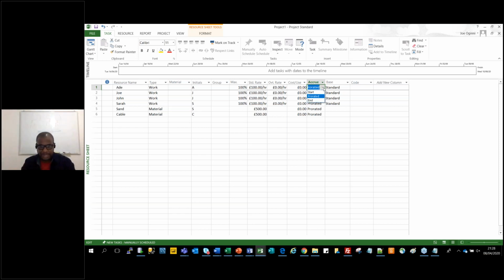But if you put it like you pay them at the end, you may be having too much money on paper, but not enough money in the account. Why? Because your system is not calculating it as it should be. And actually, you haven't paid them. Now, but your account knows you paid them. The system is saying you have more money because the system is thinking you're paying them at the end. But actually, the guy has done 20 hours, taking £2,000 off you. So the bank account is short of 2,000.